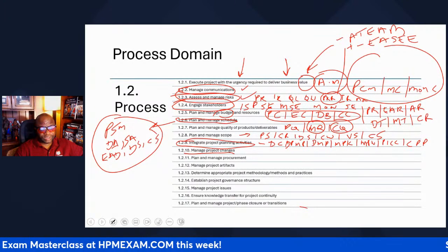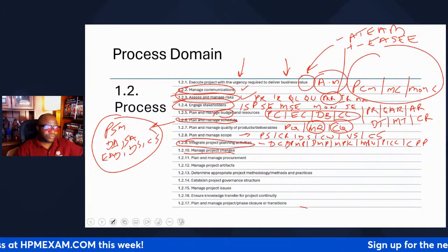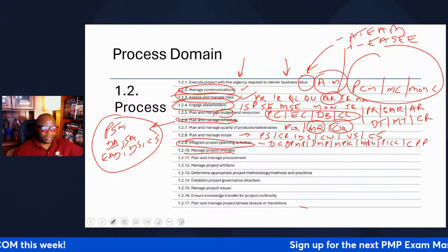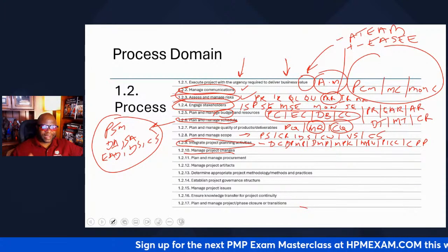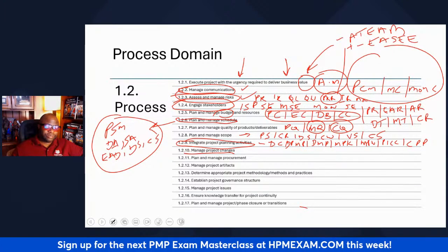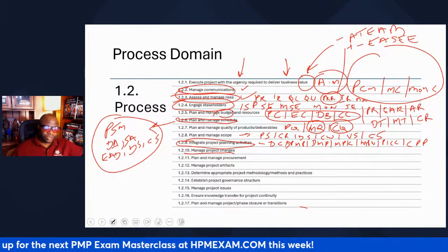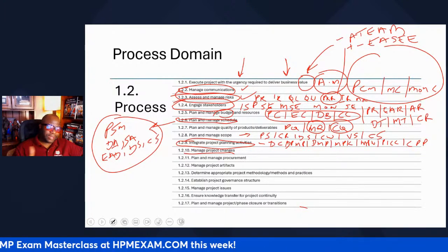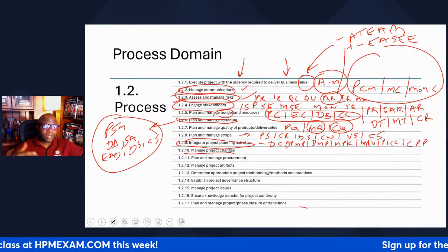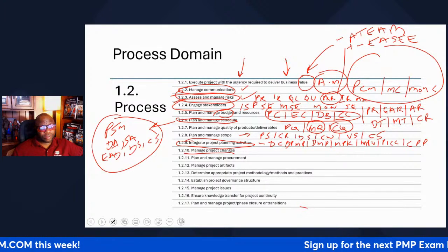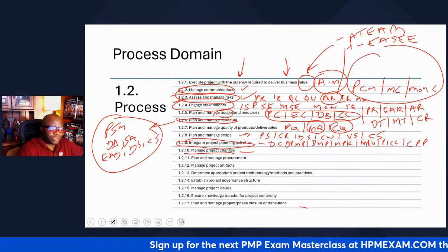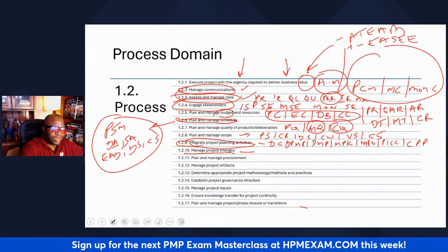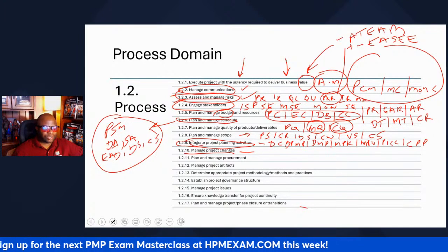But in the world of predictive, we do it differently. We ask for a change request form to be filled. Then we analyze the change request. We put together our feedback, send it to the change board. The change board analyzes it. They decide to go or not go ahead, or they could get in touch with the customer for more. And eventually they say yay or nay, or they may put it on pending on hold. But all of these changes are talked about in the area of integration in PMI's literature.